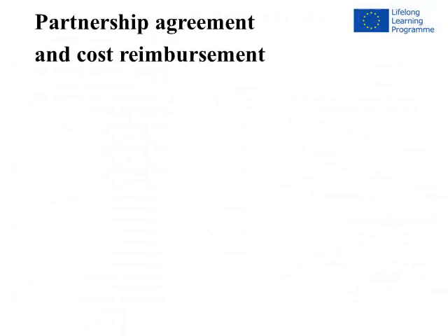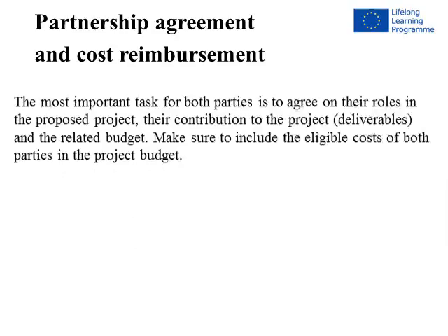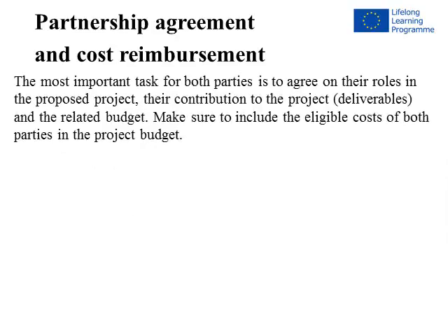Partnership agreement and cost reimbursement. The most important task for both parties is to agree on their roles in the proposed project, their contribution to the project, deliverables, and the related budget. Make sure to include the eligible costs of both parties in the project budget.